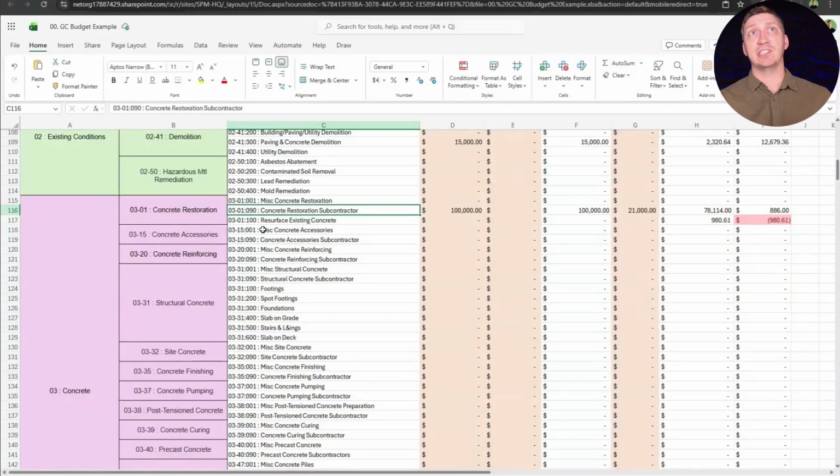And you'll notice that trend for all of these cost codes moving down, because we always want to track whether it's something we did or something somebody else did. It helps with a certificate of insurance. It helps with knowing if it's somebody else's responsibility, if it's kind of a locked cost, or if it's something that we are having to actively manage. Because a lot of general contractors, although most nowadays are more like paper GCs, they don't actually perform the work, they just kind of manage everything.